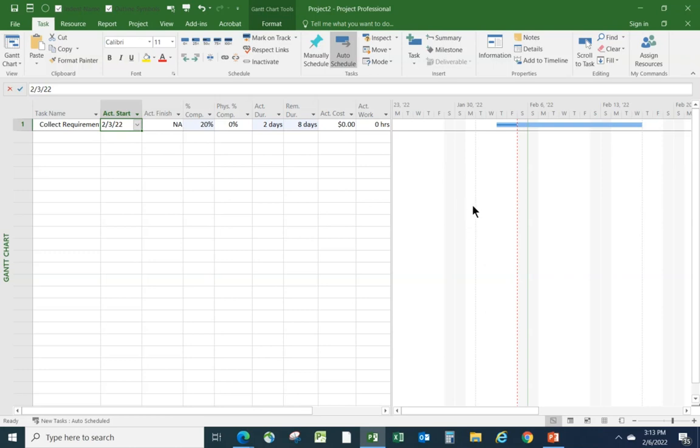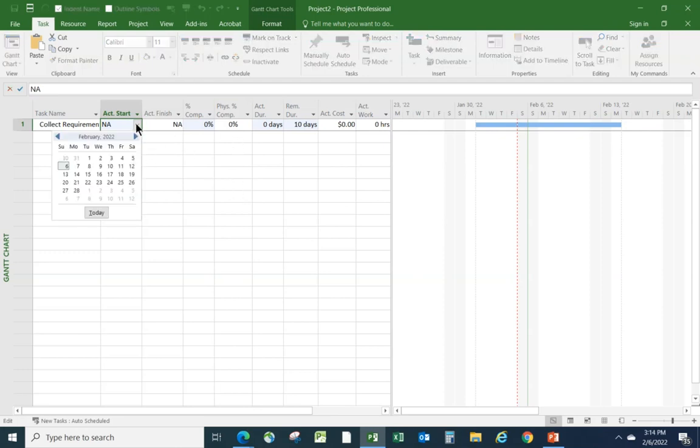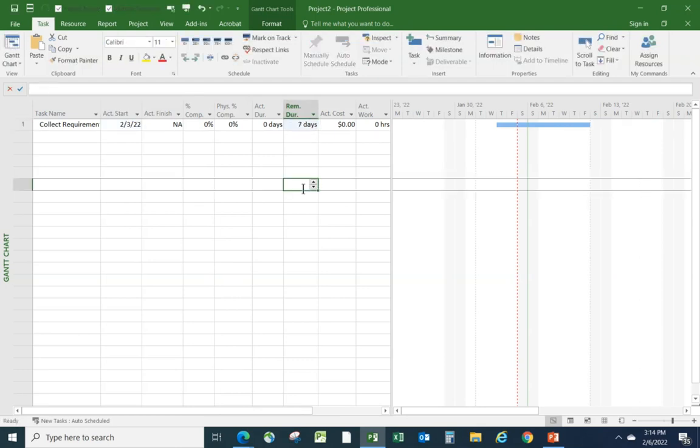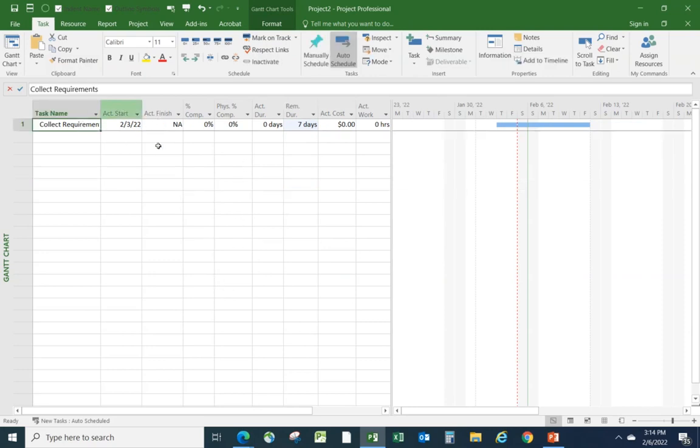Now, another possibility, of course, is the person might say, well, actually, I don't need all that amount of time to get that done. So let's set it back to 0% complete. Let's set the actual start again to Thursday the 3rd. And then the person says, I don't really need the full 10 days, boss. That's why I started a bit later. I only need 7 days, in fact. So let's drop that down to 7 days. And then when you move on to the next task, the last thing to do is to say to project, okay, now mark it on track. And project calculates that is 29% complete for you.